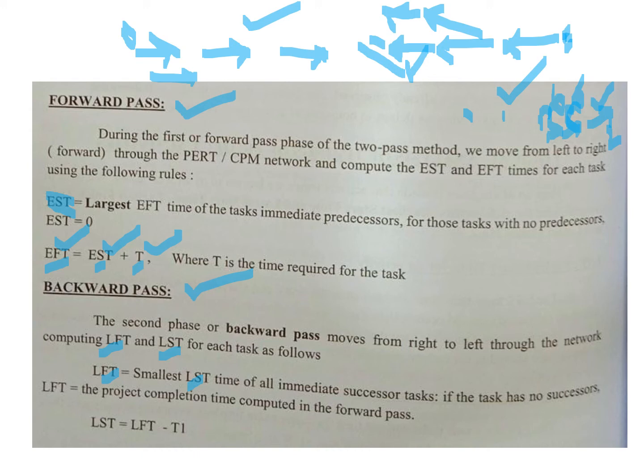So now we're looking at the latest finishing time, which is the smallest latest start time of the immediate successor, right?